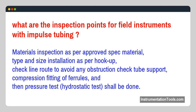What are the inspection points for field instruments with impulse tubing? Materials inspection as per approved spec — material type and size — installation as per hookup, check line route to avoid any obstruction, check tube support, compression fitting of ferrules, and then pressure test and hydrostatic test shall be done.